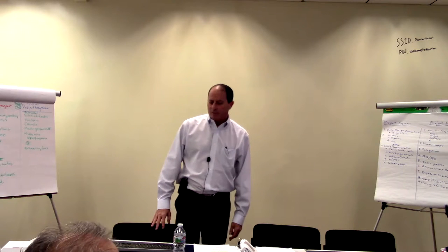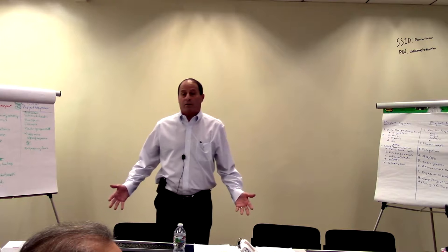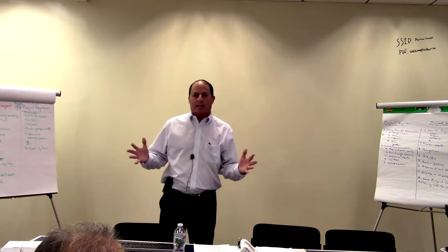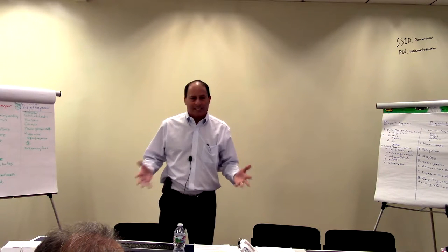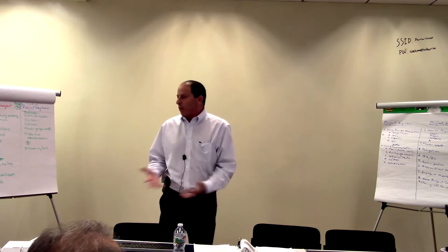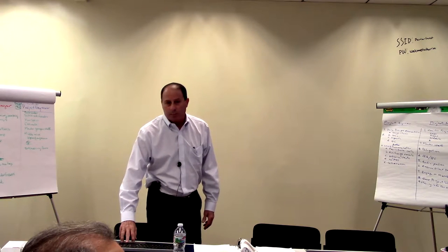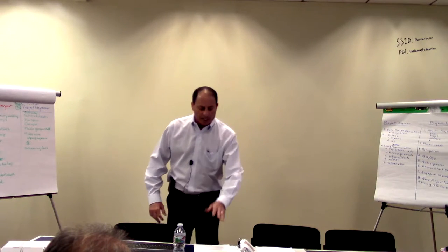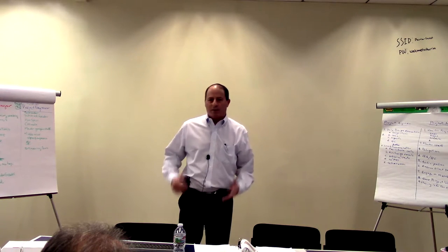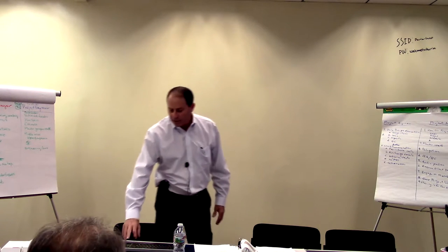Anybody else? So I'll just share a couple of thoughts there. One, if you're not technically competent, you really don't have a clue about the details of the assignments. You don't even know who to give what to, or recognize if they're good or need help. So part of it is just understanding and being able to direct people. If you're not competent and you say, yeah, I need that by noon, and that person goes, are you kidding me? That's a 3-day job. You have to have some level of competence that enables you to put a budget out and give people direction.